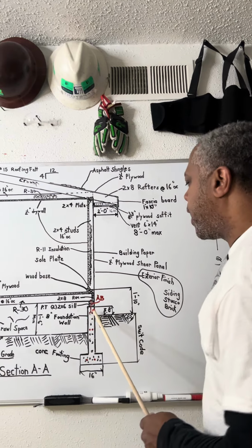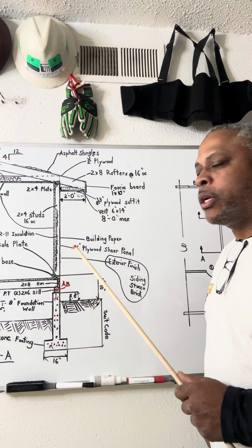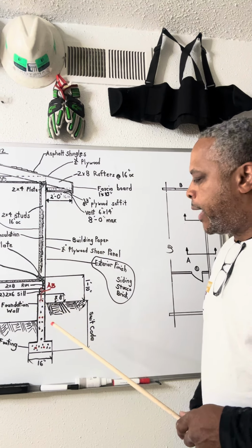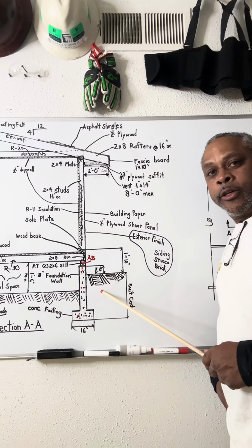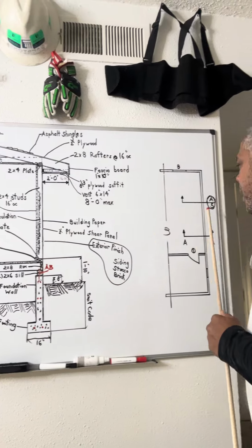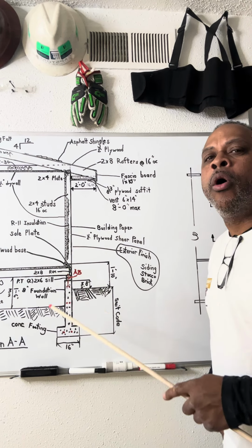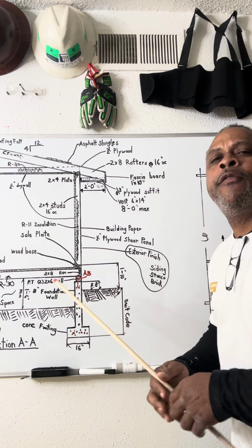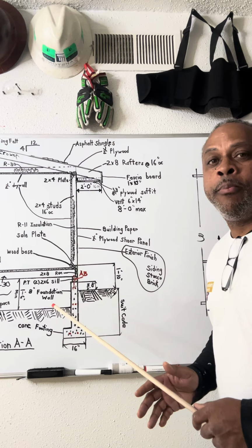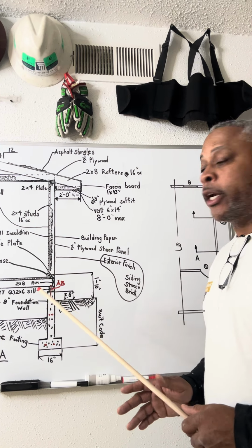Your stem wall, you have rebar. Okay? Pay attention, because in your foundation, there are going to be some detailed drawings, and they're going to have letters and numbers. And that number is a detail. Number 5 is going to be for that area, and it's going to have a circle around it. All the rebar, the lineal footage going around your house where you have a foundation, your rebar needs to be calculated in lineal feet, which means there could be quite a bit of rebar.